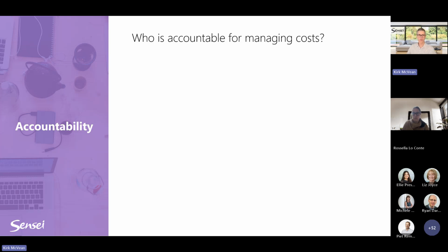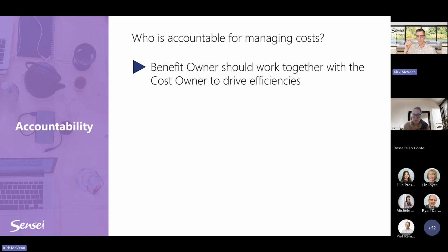Costs, very similar question. Who's accountable for the ongoing costs after the project's done? So we've delivered the project. Maybe we built a new product or business unit, and we have to hire a whole bunch of people. Well, that cost is a part of the benefits realization for the project, but who's accountable? Well, it's probably the P&L owner, right? But the benefit owner, yeah, senior responsible owner or sponsor, great. Man, you're my people. Great work, team.